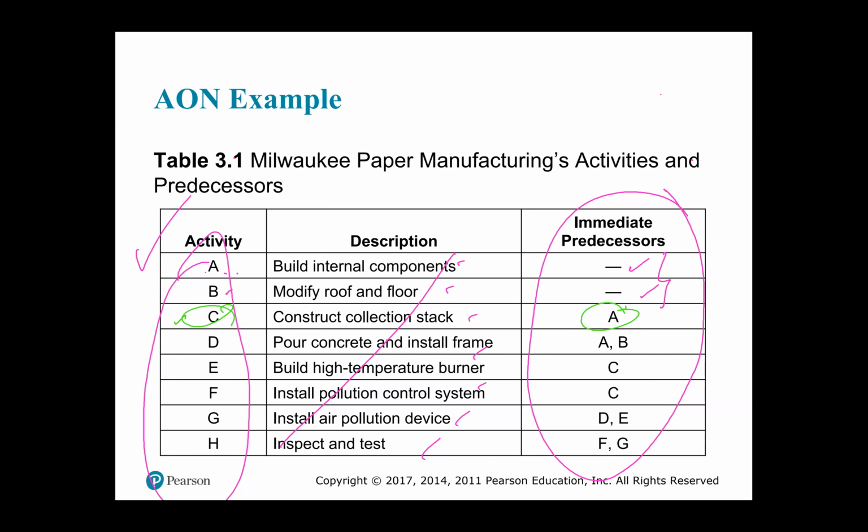And notice the use of the word immediate predecessor. So we're talking about something that must be immediately done. We're not talking about all the things that would have come before. We're talking about immediacy. What must be done now, then. Okay? So some students will say, Miss, but if you're going to draw P, what about all the letters that come before P?